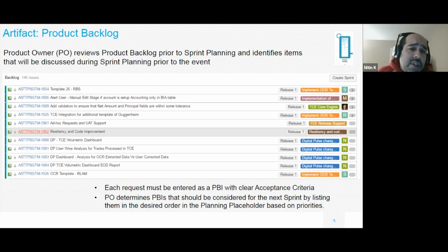Right, and very quickly, you don't typically hear about requirements as high, medium, low, because then you get into all kinds of other variations. This is a medium high or a medium low. No, we want to be absolutely clear. What is it that the dev team should work on first? And that is on the top of the backlog.